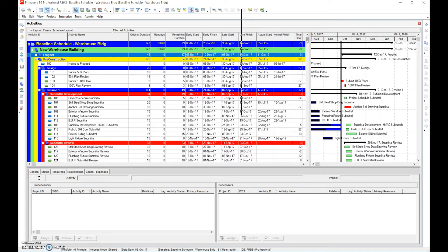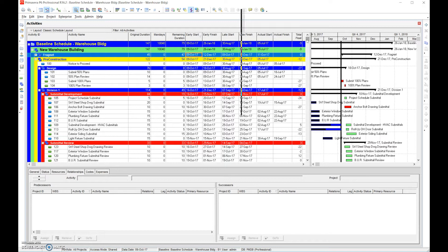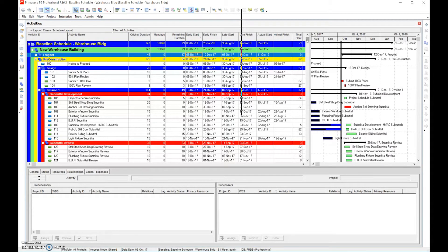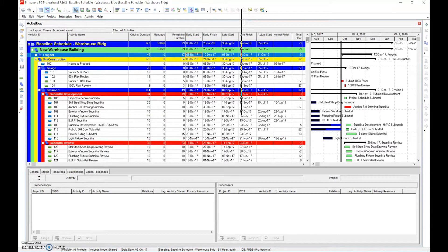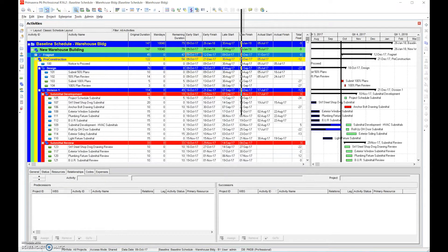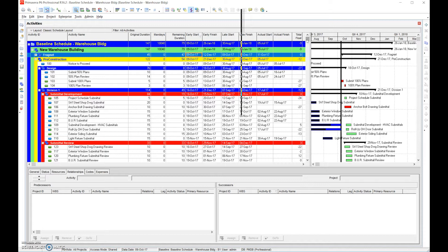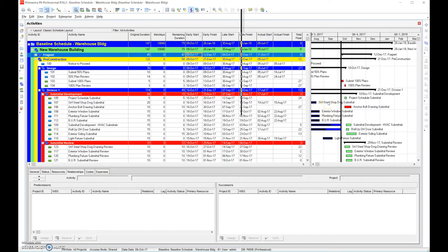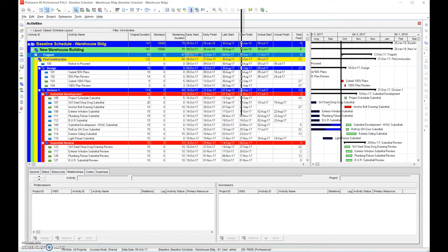We're going to do three things, or actually four. First one is we can change the relationships. We can make things from a finish to start to a start to start, which usually is the most common kind of relationships. We can use a finish to finish from a finish to start. So there's a couple different ways we can change relationships and reduce the amount of time. The more stuff we do at any point in time, the quicker we get something done. Number two is we can add additional resources so we can double crew sizes, increase our availability, work weekends, work off time. And then the third thing is we can change the materials or we can change the means about going about doing things. So the last two are really tough and we won't go into that here. So we're going to talk about the first two, changing relationships and adding additional resources.